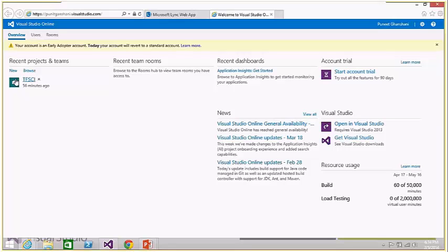Since I chose Scrum, it will show sprints, where you can define your backlog and product catalog and everything. So I can go and say, okay, I need a product backlog item. Let's say create a data entry for bugs. Okay, and that is to be assigned to me. Fine, good enough. It's on the top priority, and I say save and close. So I can say create a book repository that takes in ISBN, author, ID, and book name. I click on save and close. So you can see there's a product backlog item created.